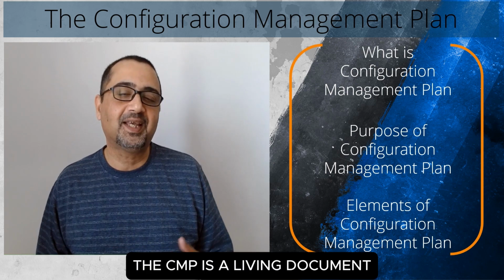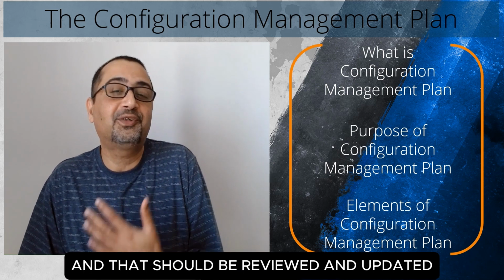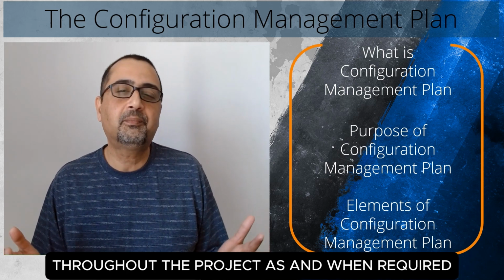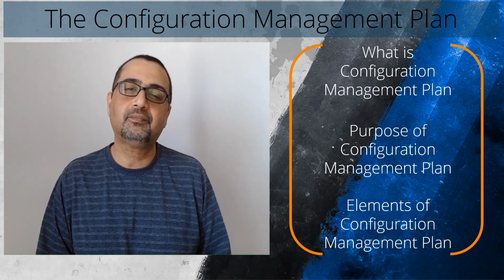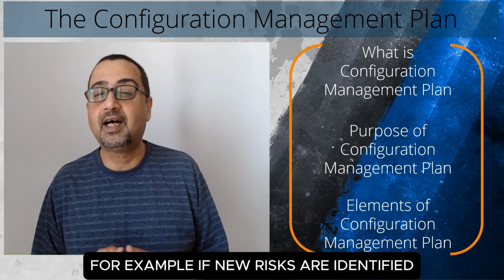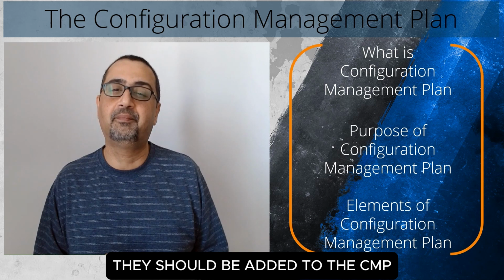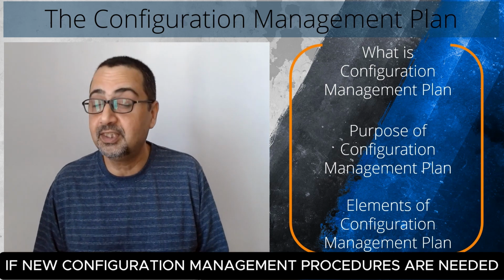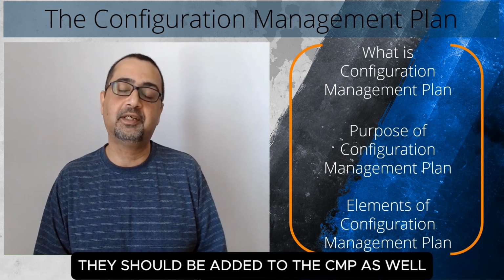The CMP is a living document that should be reviewed and updated throughout the project as and when required. For example, if new risks are identified, they should be added to the CMP. If new configuration management procedures are needed, they should be added to the CMP as well.